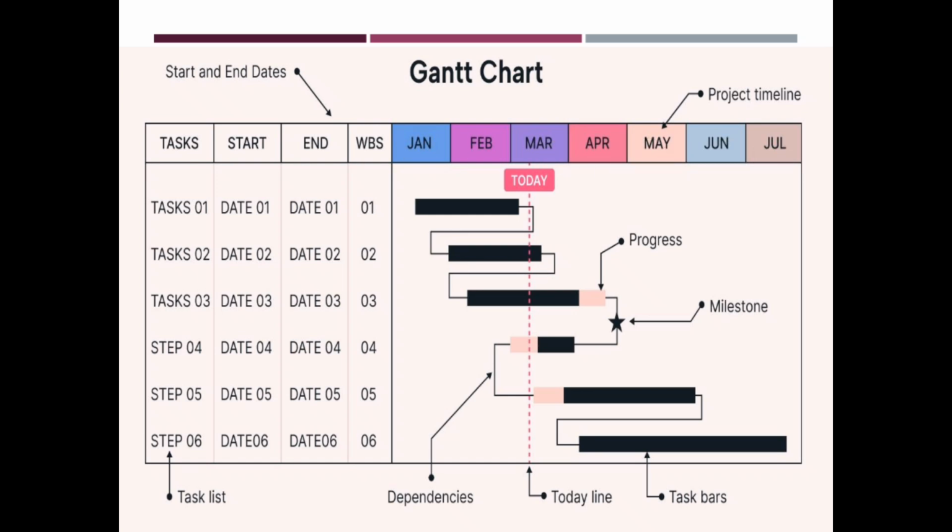From there we have got bars, here black bars. These are representing the tasks on a calendar. So for example, this particular task is starting somewhere early January up to somewhere early March. So then this one is linked by this particular line to another second task, which is represented by another bar line here. And this one is running from somewhere end January up to somewhere close to end March.